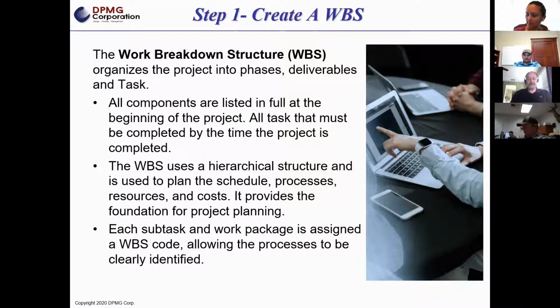And this is also true of internal projects. I've seen this where companies try to financially manage internal projects the way they manage their production work. It does not work that way. Tracking a project financially is different than how you would manage a production function, and so you really need a different structure for managing that. And when we get into the budgeting, we'll talk a lot more about this. If you're going to use the financials to manage the project, then the financials need to reflect how the project is actually broken down and how the work is broken down.